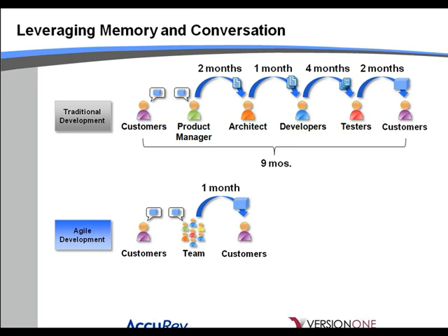Okay, even better, the time between when a developer does something and somebody in QA and a doc writer gets it could be on the order of days. So there's a concept here called one-piece flow. A developer starts working on something, he gets it to completion, writes all the unit tests, makes sure it works. The test person does additional work there, exploratory testing, additional unit tests, test automation, whatever it is. That task is going to be complete within a couple of days, and then he's going to work on the next thing over and over again.